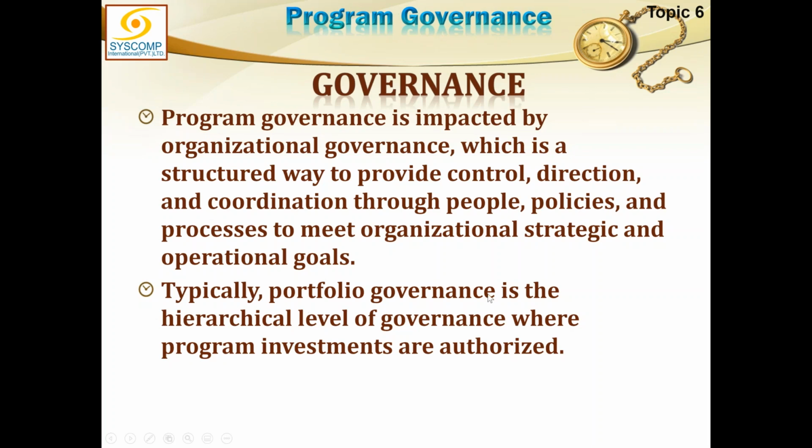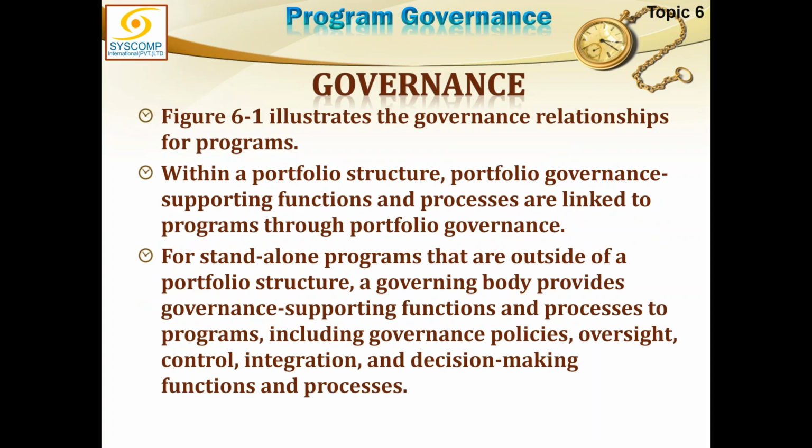Typically, portfolio governance is the hierarchical level of governance where program investments are authorized. The purpose of a portfolio was not to run the program, it was to select the programs or projects which are to be run. So where the portfolio should invest, in which program or in which standalone project it needs to invest, which is most suitable, that much is portfolio governance.